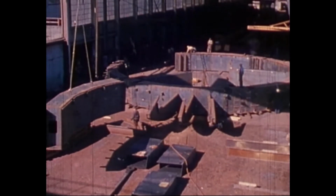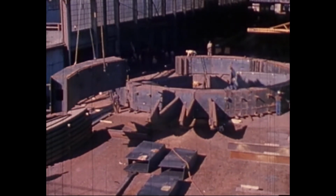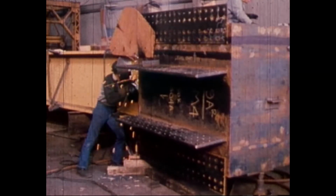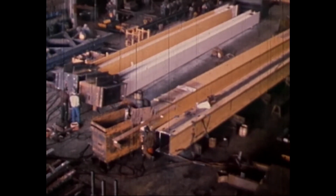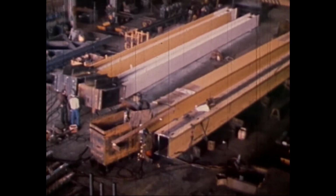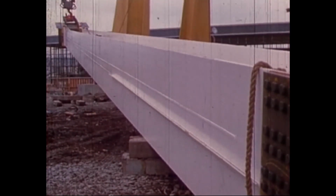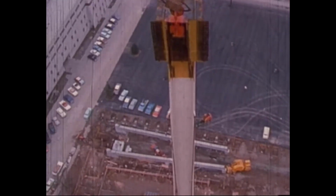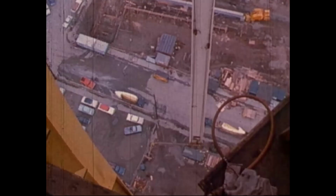Meanwhile, the fabricators assembled a ring girder for the Space Needle restaurant. After shop assembly, small sections from the ring will be joined with the top leg sections. Midway in fabrication and erection, the needle's color scheme has been set, and most members are now going out to the site with their final finish. This box leg is almost 80 feet long and the most difficult lift of all for the derrick. These sections flare out at the top like 6 fingers holding a saucer, and the crane has to work with a boom almost flat. The tower is now at the 500-foot level.